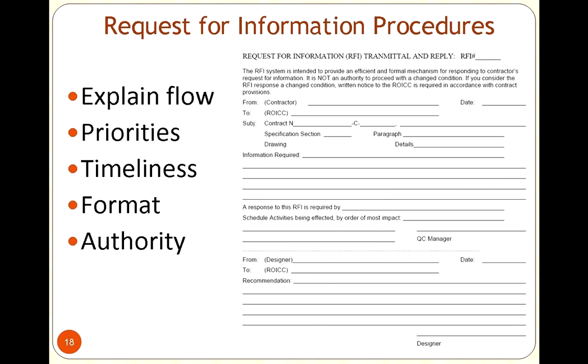We just talked about if they send you information, but what if you need information? What we would also do is say, we're going to request information from you in a very specific way. I'm not just going to mention it to you while I'm at the job site. I'm going to probably submit something official, and the reason I'm going to do that is I'm going to hold your feet to the fire if you don't give it back to me, or at least I'm going to track the status of that request.